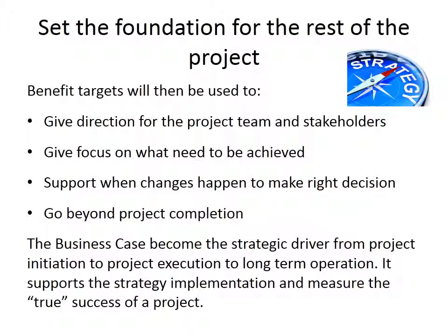It will also help, if you have to make any decision, if you have to revise the scope, or there's a change in the budget and you have to cut things, you will make these decisions based on the value that you want to achieve, and maybe take out elements that will not impact as much the value that you want to achieve at the end. So in terms of change management, in terms of decisions that you make throughout the project, it will ensure that they are backed up with the right focus, the right approach to still ensuring that we will deliver value.